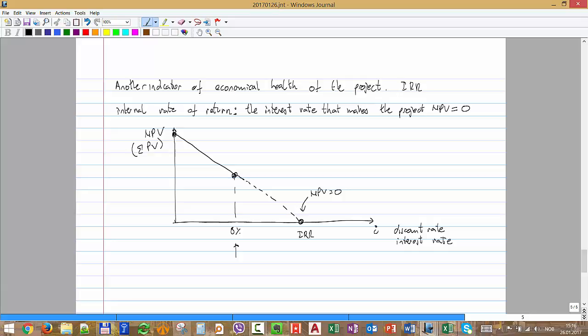If you say that it's 8 and you obtain one that has 16, you are relatively far away, okay? But if you obtain, for example, 8.1, that means that really a small variation can make it negative, has a big impact. Okay, that's another indicator, and there are some other indicators that we are not going to discuss here. Okay, in this course, we are going to use these two main things to try to determine if our project has value or not.